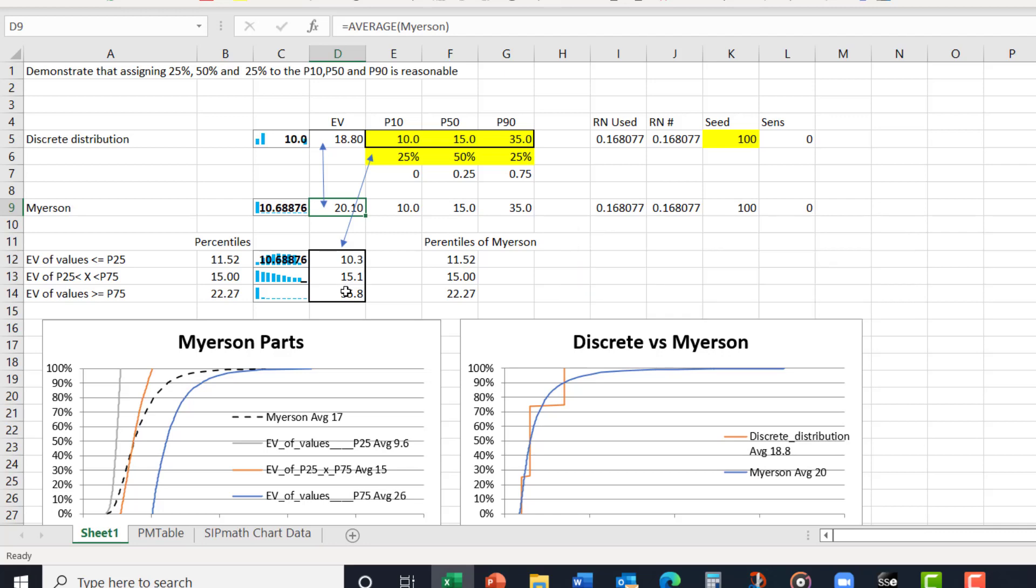So this is why I think using 25, 50, 25 is the right number, that represents the equal area solution.